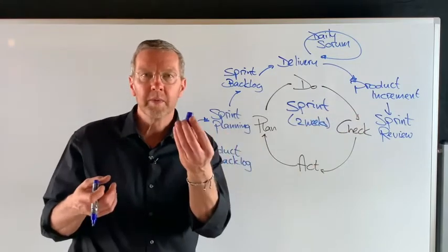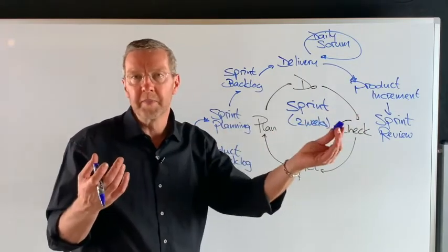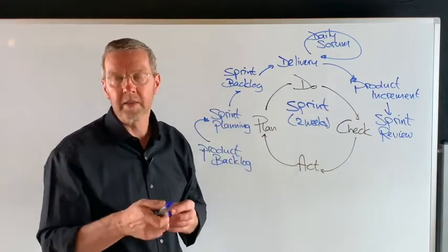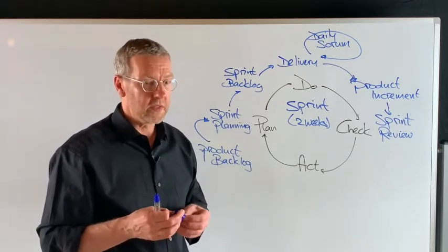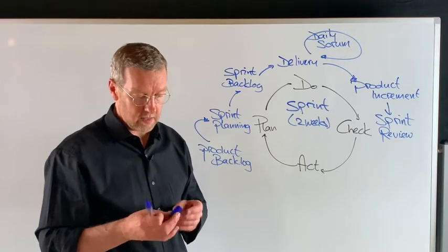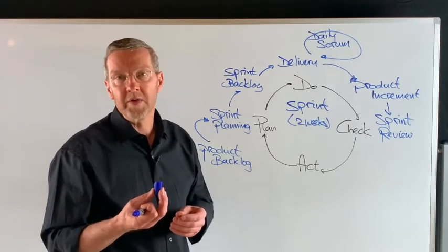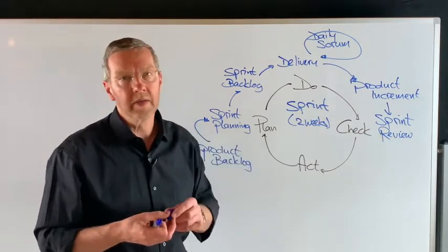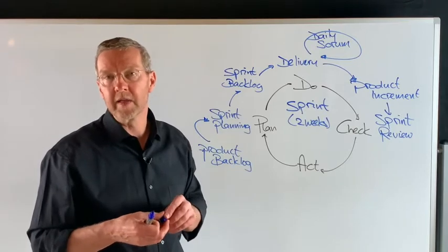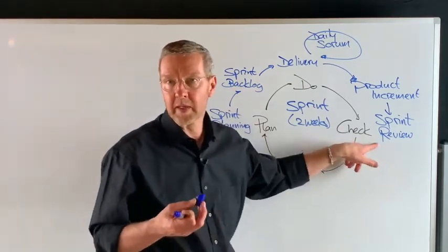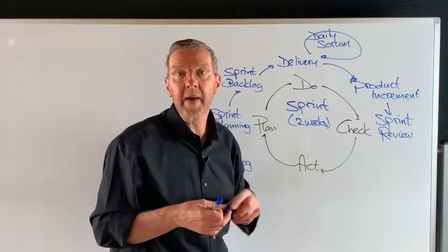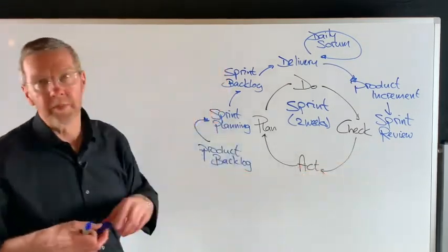You don't want to end up with a cap after a number of months of development of that marker, ending up at manufacturing, and then having a manufacturing engineer say, that's too thin. Because then we're way down the line, and it's going to be very expensive to get fixed. But with two weeks' worth of work and manufacturing giving negative feedback, now we can do something.